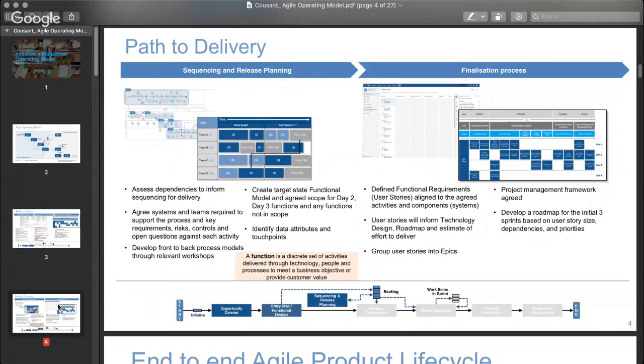So for instance, if you're talking across different platforms, so you've got your website, the front end, but you've got the back end, right? The back end might need to connect to some kind of database to store the information, but at the same time also connect to some kind of a workflow that will let your internal staff know that a client has put in information. They might need to follow up with that client. They might need to call the client, or whatever it might be. They might need to update some documentation outside of that platform, right? So all of those things have dependencies on each other.